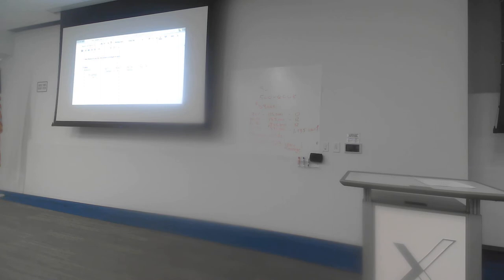Now, as well as putting in I in there, because I has only got 1 day of which I can crash it, once I crash it down to 2 days, that's it, I can't crash it anymore. So to keep track of that, usually when that happens, I put in a little asterisk to say that this activity has been crashed through the limit, I can't crash it any more than that.